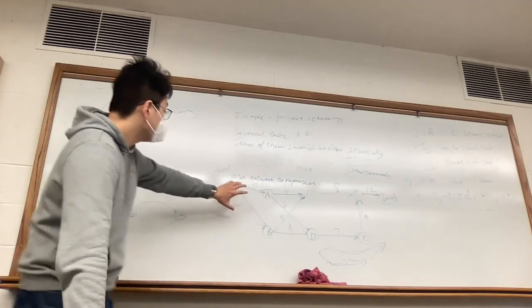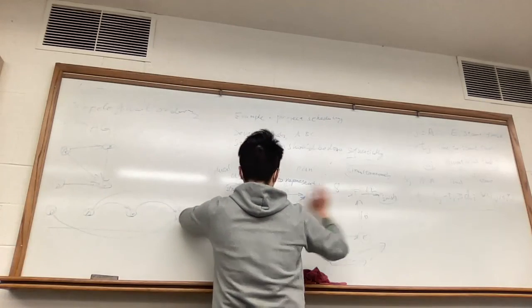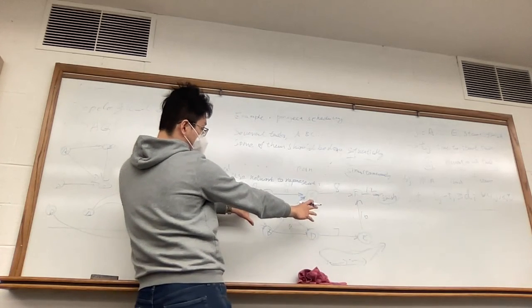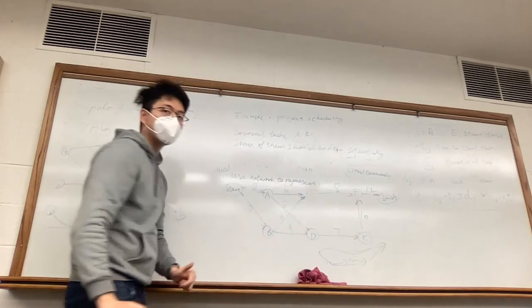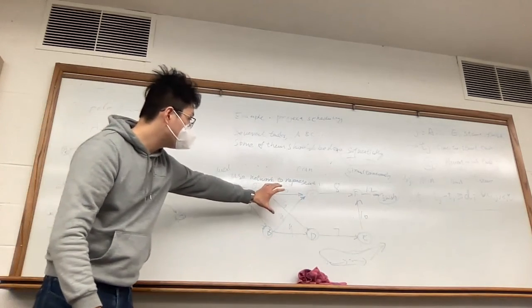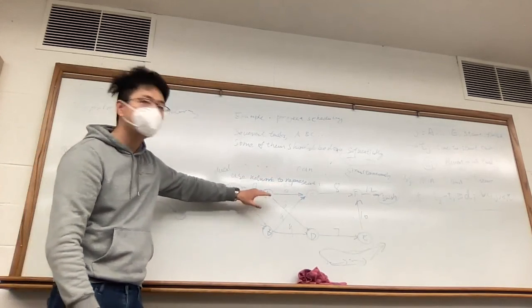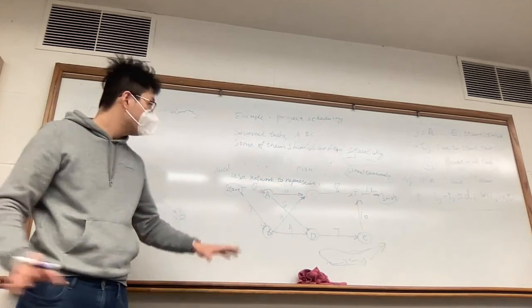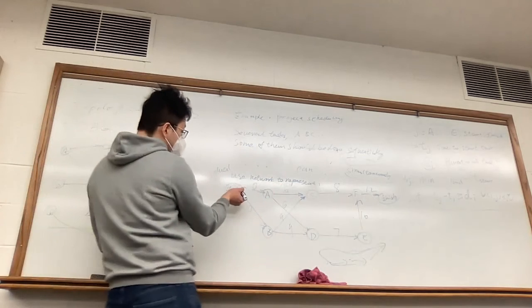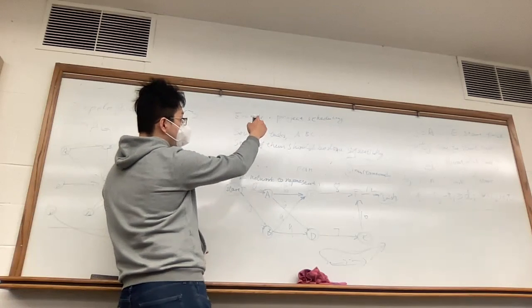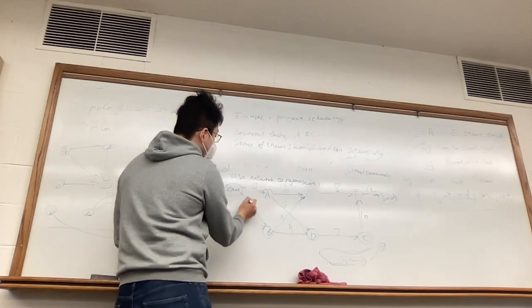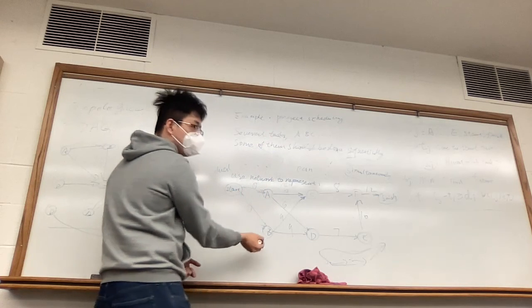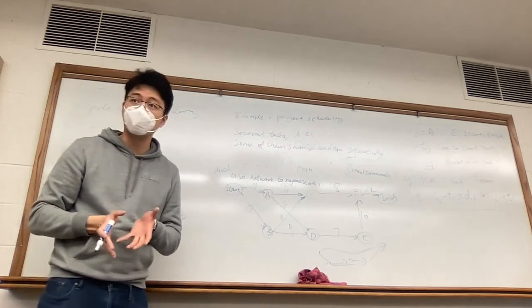If you ignore the start and finish and just look at those 6 intermediate nodes, then if you draw a topological ordering, you can put A first, B second, or B first, A second. Doesn't matter at all. So that's the reason why, when we construct this network for the project scheduling problem, after you add the start and finish node, we only point from start to A and start to B, because they have the lowest topological ordering.